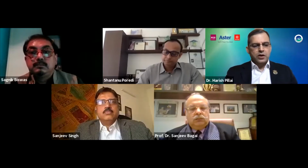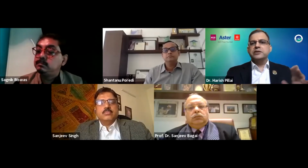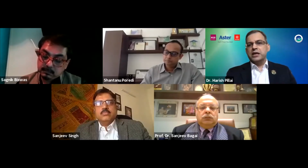My last point is also because we are a private for-profit organization, it's very important that when you plan the capex, the kind of investments you're going to make, you have to also talk about life cycle maintenance costs post commissioning of the hospital. If you have a large footprint, then the housekeeping expenditure is pretty high, maintenance expenditure is quite high. Can you really look at smart technologies to incorporate from day one so that your utility cost is kept at an optimum space? So these elements, if you take part as part of the ideation and design stage, then you can really focus on the core purpose of your facility, which is basically patient care, and not really worry about other headaches.